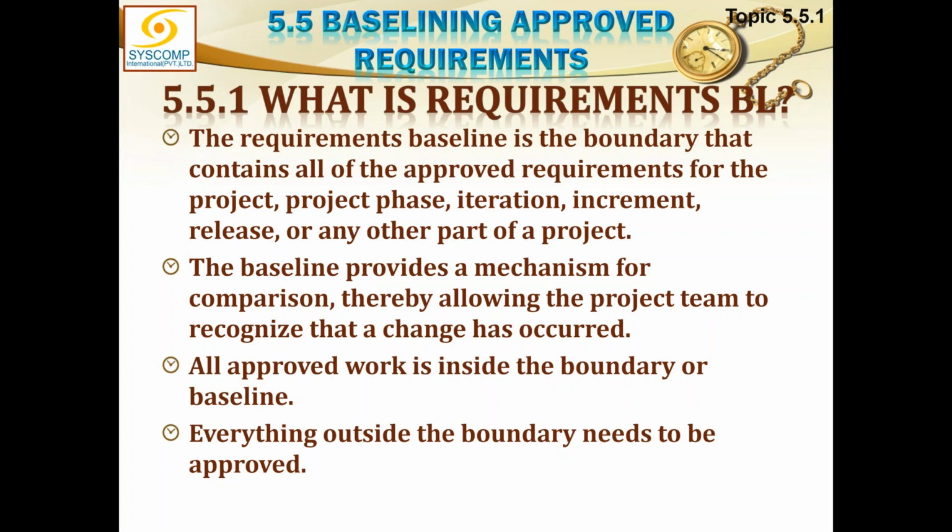The baseline provides a mechanism for comparison, thereby allowing the project team to recognize that a change has occurred. So if at a later stage you need to compare what you are making with the requirements, you can always trace it back to the baseline. Even if there are changes to the requirement, they have to be entered into the baseline through a proper approval process. All approved work is inside the boundary of the baseline. Everything outside of the boundary needs to be approved. So anything which has not been approved so far is not baseline.